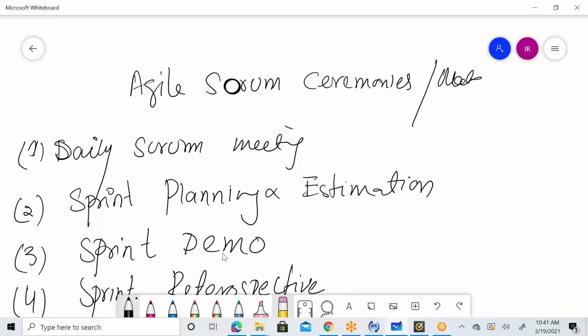Within your sprint, which is a 2-week timeline, developers are going to code based on the documentation you provide. Testers are going to test based on the coding, and you are going to view that ticket using that link to check whether it has been coded properly, put commentary on it, and then close the ticket. One by one, these tickets will be closed, and this whole process is done using multiple meetings, such as daily scrum or stand-up meetings, where you discuss who is doing what, what did you do yesterday, what are you going to do today, and whether there are any impediments or issues, which you can discuss after the meeting. That is going to be only a 10-15 minute meeting.